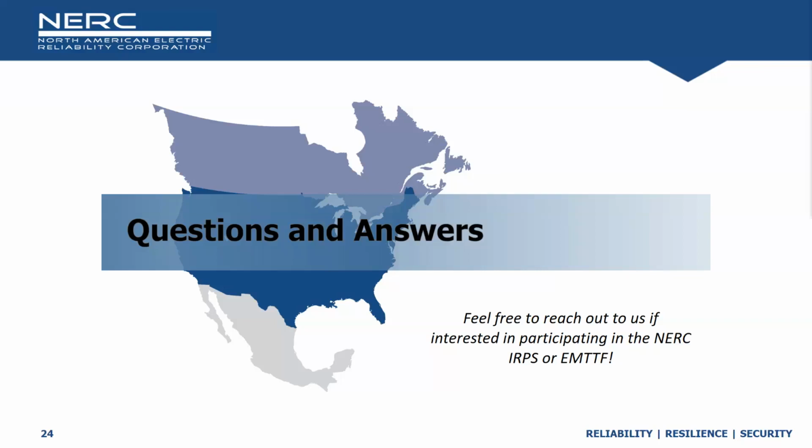And then when they go out and commission, they commission default parameters and do that parameter verification or parameter matching during commissioning. And you find out that, hey, I set different parameters. They don't match my initial responses from the interconnection process or the tests that were done then. And then what do we do now? What is the next process? Going back and adjusting those parameters is going to cause time and cost again to them. So that's the biggest disconnect there.